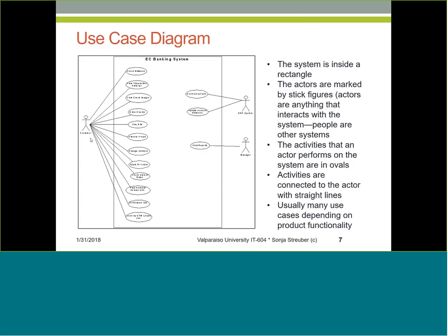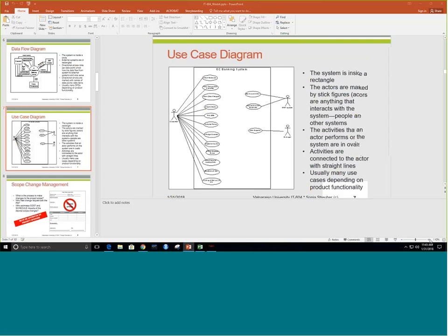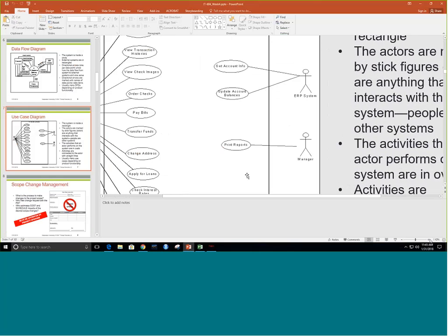Now, building to rent, acquiring a facility, and other connected steps. This is where we're breaking it down into individual tasks. So let's take a look here. Here we have our acquire facility, install network, install front, and so on, right? So now, as I said already, acquiring a facility, that is finding a building to rent, contains a lot of other steps inside of it. So we're going to untangle these now so we don't forget to do perhaps crucial steps.